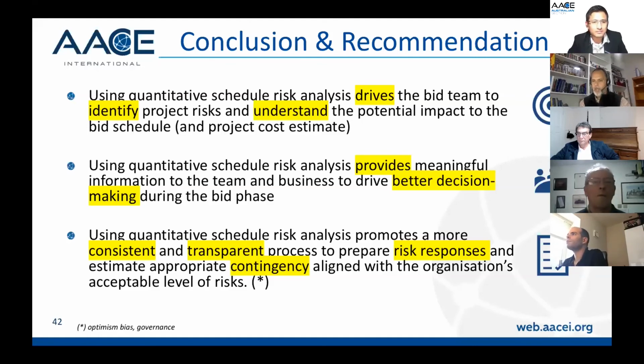Yes and no. We have been in projects, and I have been having this conversation with colleagues in Europe and in the US, where you have projects that say, look, you need to bid the job as business as usual, and then any impact from COVID-19, we just open the book and we have a look at this with you, client. We have clients that say you need to account for COVID-19 until June next year. And what we have seen is that you need to have a look at the potential impact on productivity. There are some contractors that say that productivity dropped about 20% because of COVID-19, with social distancing on site.